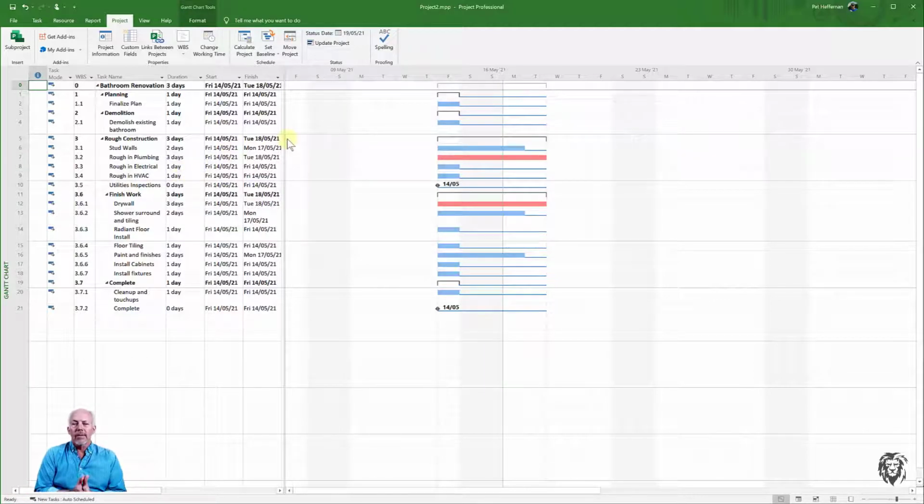In Microsoft Project, we call them predecessors, which is to say those tasks that have to be done, or near done, we can get into some of those nuances later on, before we're able to start the task that we're looking at. And so it has to precede it. And then the corollary of that, of course, is successors, those tasks which should follow the current task that we're working on. But normally we try to think of what has to be done.